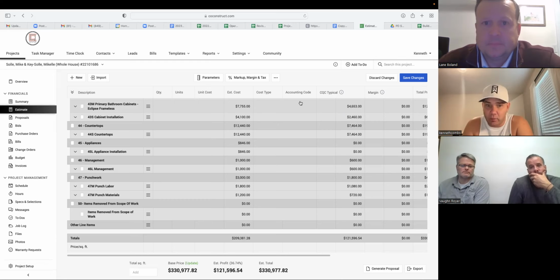I think as soon as we go do the measure meeting, that's the first chance that the design team has had to look at the job outside the PD. So they go measure the job, measure existing conditions, and within that first week, before they start doing work on the job, they meet with the PD. That's in the PD SOP, and we'll give you that when he gives you the list of meetings.